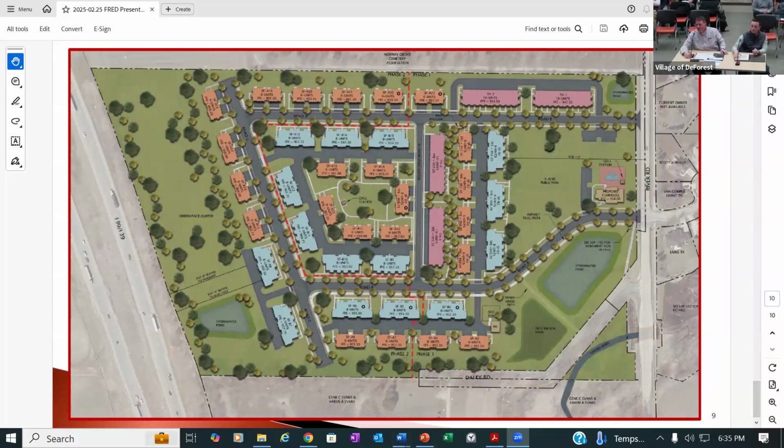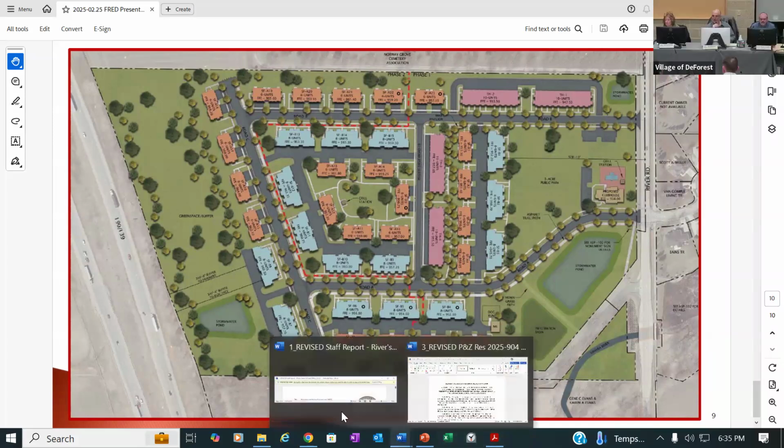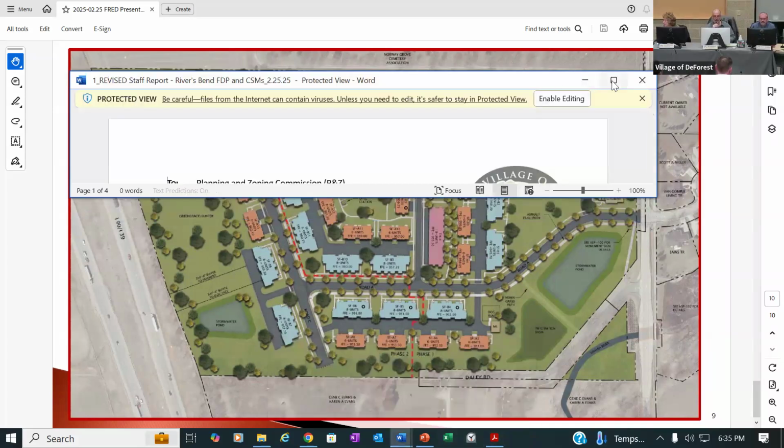Yeah, so we build the clubhouse first. It acts as our control point, and then we start building the buildings. These are a little different, but it's usually about a month before every building comes online. Okay. Well, thank you guys very much.